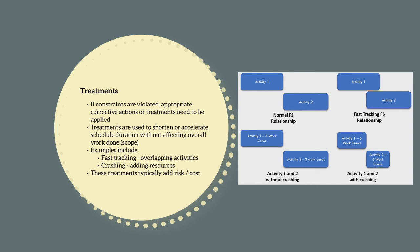Two of the most common treatments used are crashing and fast tracking. Fast tracking is the process of changing the start-to-finish relationship between activities to shorten the project duration. Under normal circumstances, if activity 2 requires activity 1 to be completed before it can begin, using fast tracking we will start activity 2 before activity 1 is fully complete. A classic example of fast tracking is the relationship between design and construction — ideally design would finish before construction begins, but construction will start before design is fully finished to reduce the project timeframe. Another example might be testing and commissioning beginning before a system is fully constructed. Fast tracking typically increases risk — if you start building off a non-IFC design, any design changes will incur significant construction costs.